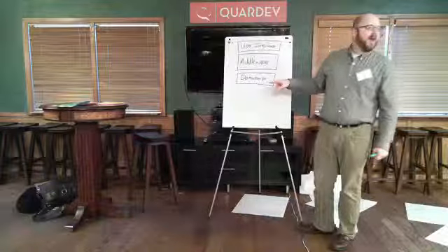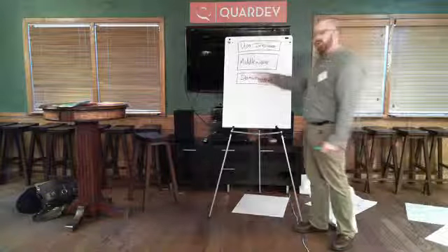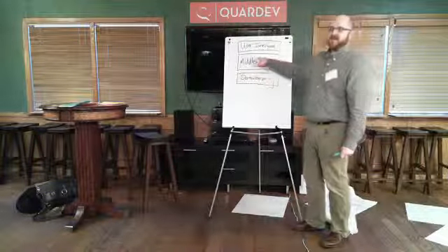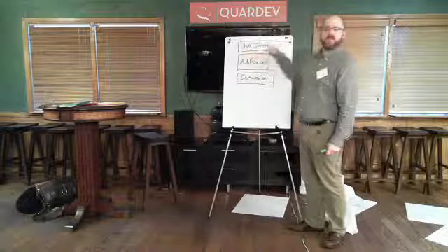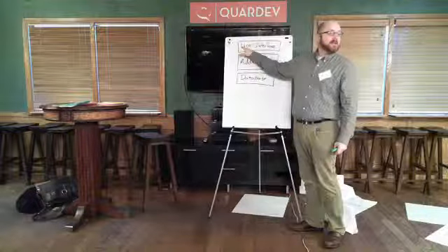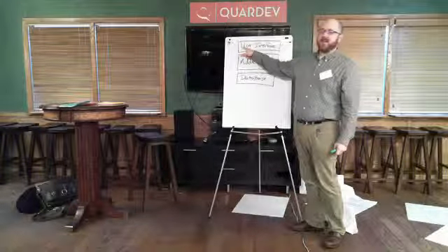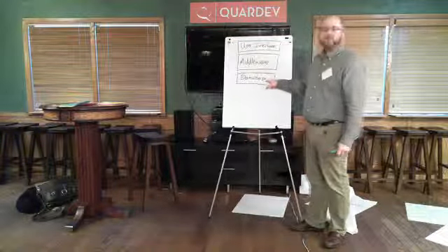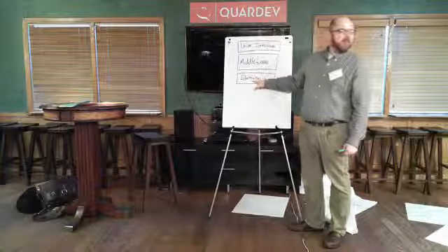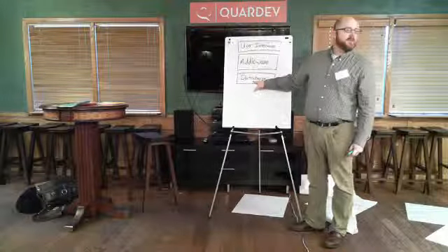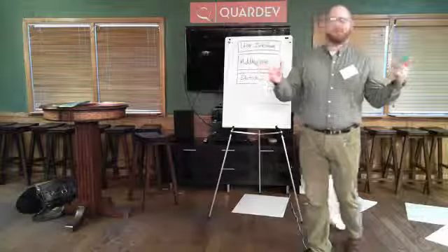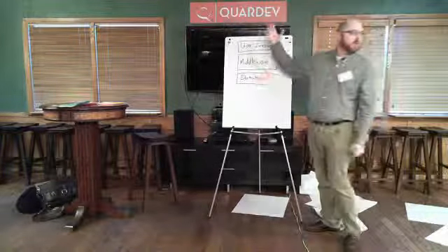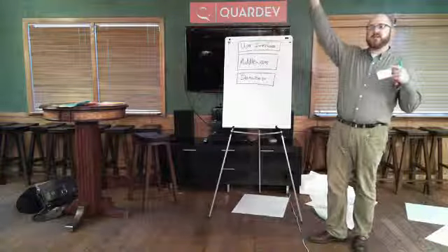You hear a lot of house stories like, I gotta build the foundation, and then we'll build the walls, whatever your middleware is, and then we'll build the roof that is the user interface. And then it's the third week of the sprint, and now it's finally testable, and we discover half of the database stuff doesn't make any sense because we've got something that we thought was a one-to-one relationship that is actually a many-to-many relationship, and we've just blown up a whole bunch of this work and pushed us up that cost curve.